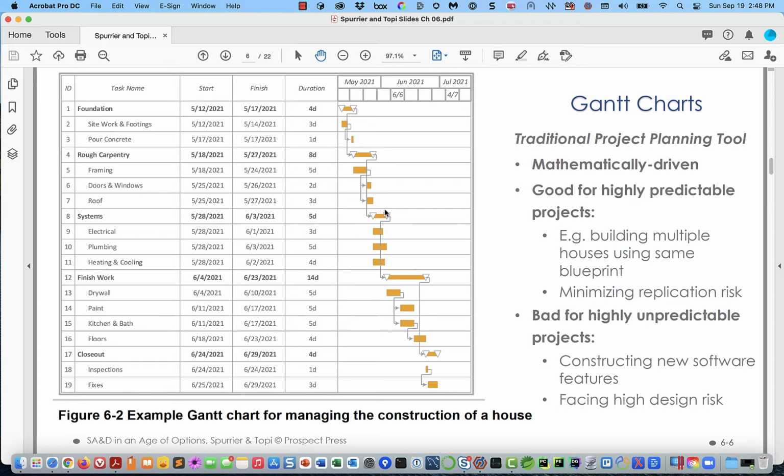So you can have what we call lead times. You have a dependency, but you don't have to wait until activity A is absolutely over. You can start when activity A has 5 days remaining. So you don't have to have this concept of Gantt Light in order to do that.